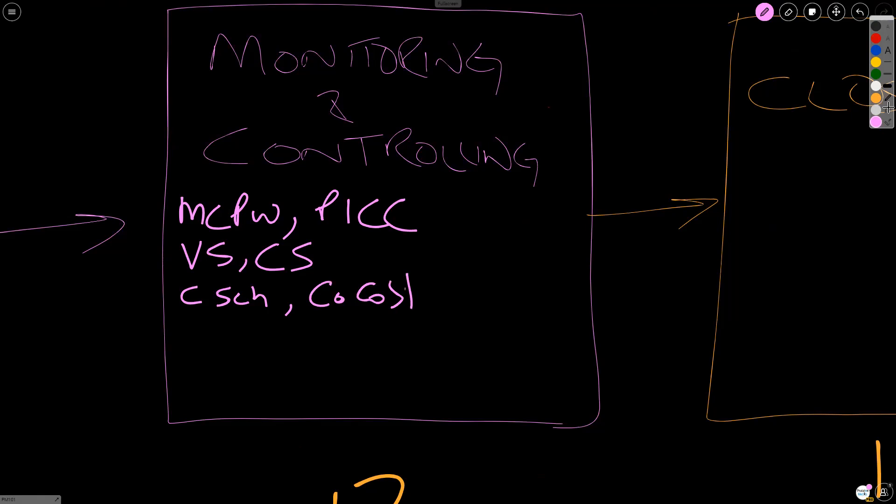In quality, we have control quality. In resources, we also have control resources. Now, going into communications, where there's human interaction, we don't use the word control. We use the word monitor. So we have monitor communications.